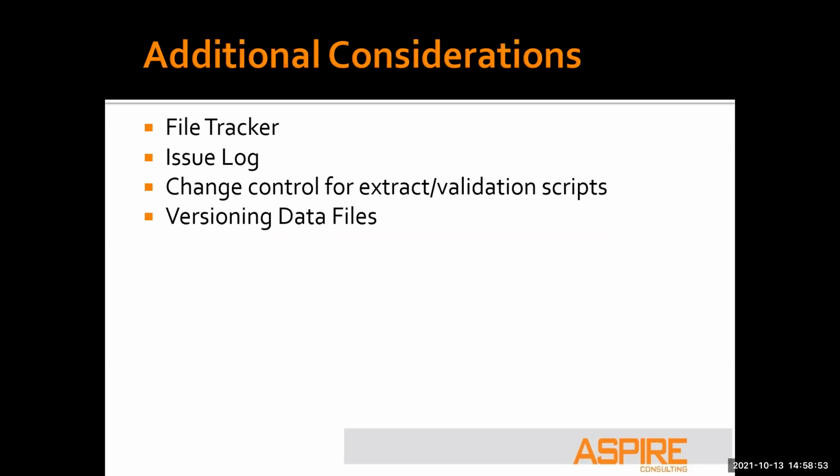In that tracker, you should track the status of it, like not started, or it's in functional validation, or we are complete with it, right? We've done our post-load validation and everything looks good. So you need a status. You need to know dates, like when should I be pulling this file, and when should I have to get it to the implementation partner. Well, when do I need to get the post-load validation to my functional team? So we get this all done in a timely manner.